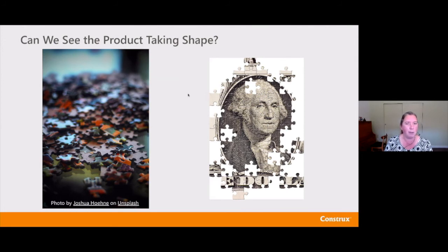I always ask people who aren't in the DevOps world, where we're just continuously adding things to an existing product, if you have releases that last for 3 months or 6 months or 9 months or a year, when you're halfway through, are you halfway through? Can you see half of what you built? If you can't, I guarantee you're not halfway through.